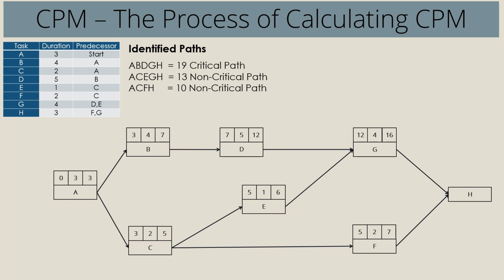Well, the 16 obviously wins because activity H depends on G and F. We can't start it at the end of day 7 or beginning of day 8 because we need to wait for activity G to finish. Activity G is expected to finish at 16, so we bring that 16 in, and 16 plus 3 is 19 for activity H. So right away, we know that the planned duration of the project is 19 days.